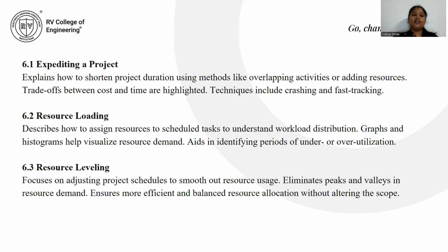Resource loading describes how to assign resources to scheduled tasks to understand workload distribution. The graphs and histograms help visualize the resource demand, which aids in identifying periods of under or overutilization. Resource leveling focuses on adjusting project schedules to smooth out resource usage, eliminating peaks and valleys in resource demand. It ensures more efficient and balanced resource allocation without altering the scope.